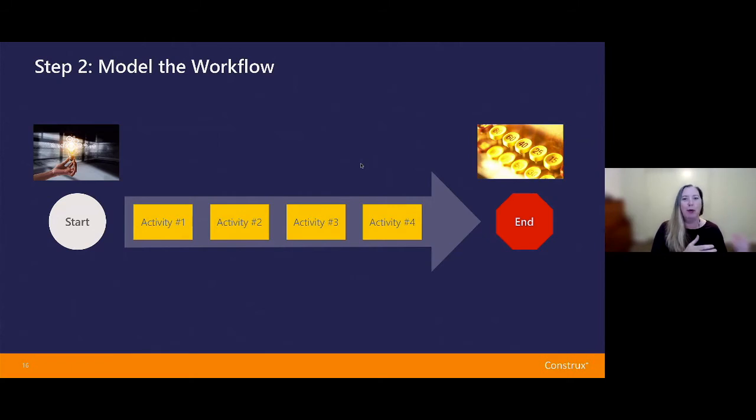And we just step through, okay, well, we capture the epic in an epic template. We make sure that we understand the business case and the user's need, why this is going to be competitive on our marketplace. And then if it's a good idea, we go forward, we do, say, an initial proof of concept, we do some technical vetting, we do some user journey mapping, and then we reevaluate the epic. And then what happens? And we go through that step until you start to hear things like, well, and then we release it to our customers and we gather telemetry data, or we do user validation with it, or we do a UAT, and then we're done. And that's when you know you're at the end.